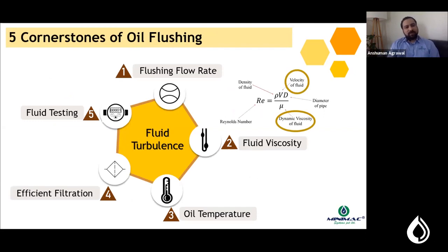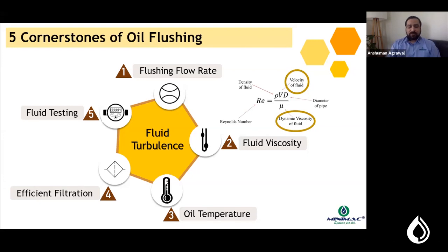Now let's cover the five cornerstones of oil flushing. The first cornerstone is flushing flow rate, which determines whether turbulence will be created in the respective pipeline. As seen in the Reynolds number formula, the required Reynolds number for turbulent flow is 4000, and it is directly proportional to fluid velocity. Therefore, the higher the flow rate, the greater the turbulence and the better the flushing.